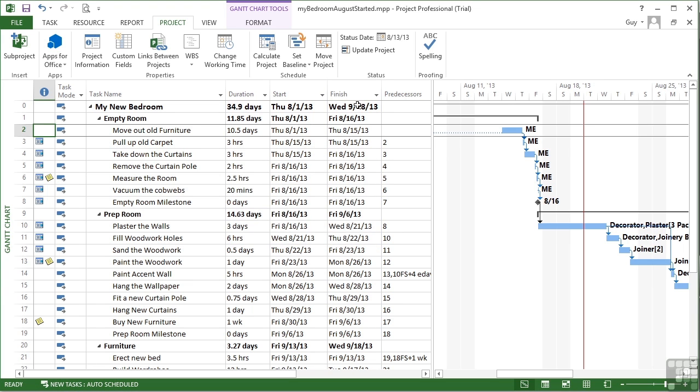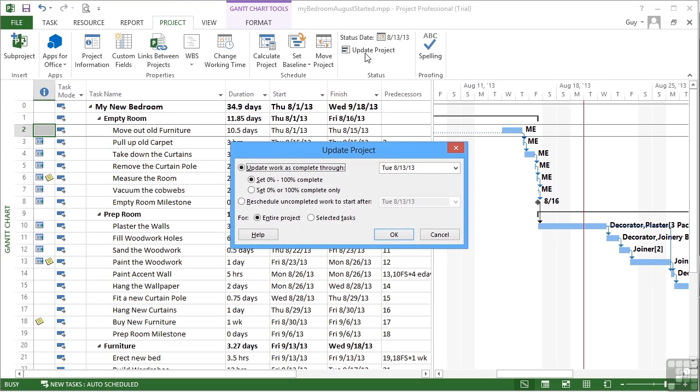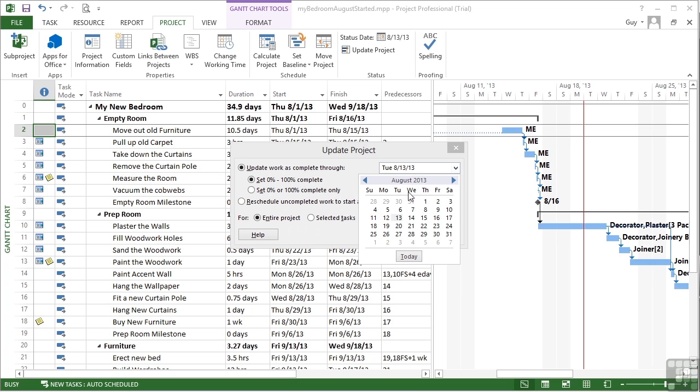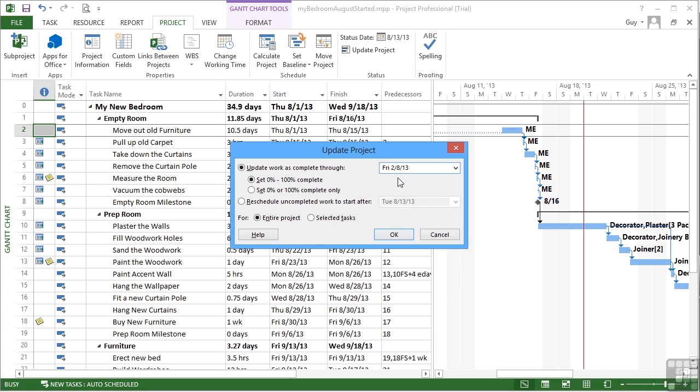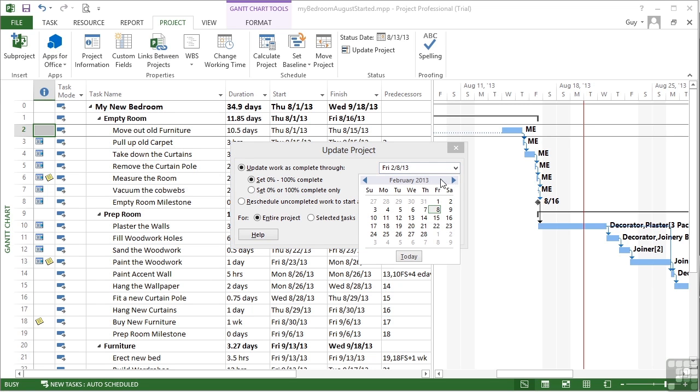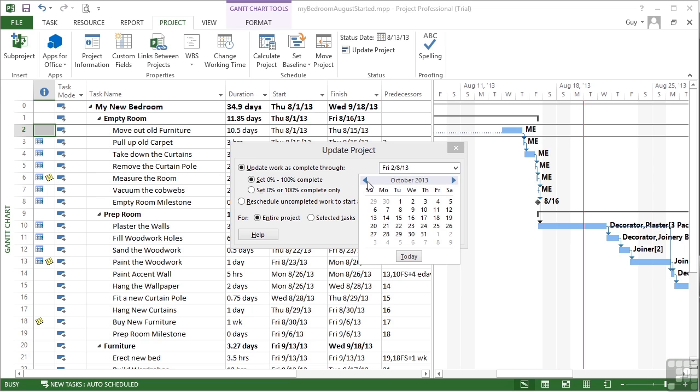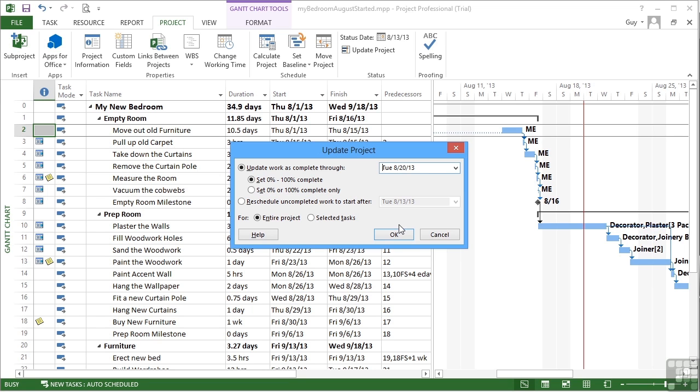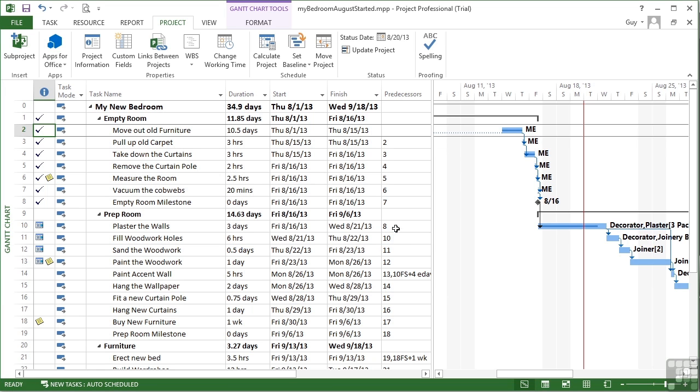If we now go to update project and say let's update as complete through to my new today's date, which is the 20th, or I can click today, and you see how it jumps to actual today's date. So be careful of that. We want to use the thinking today's date, which is 20, so August the 20th. Update is complete. OK, everything then gets marked as complete. So we've got little ticks all the way through the complete ones.